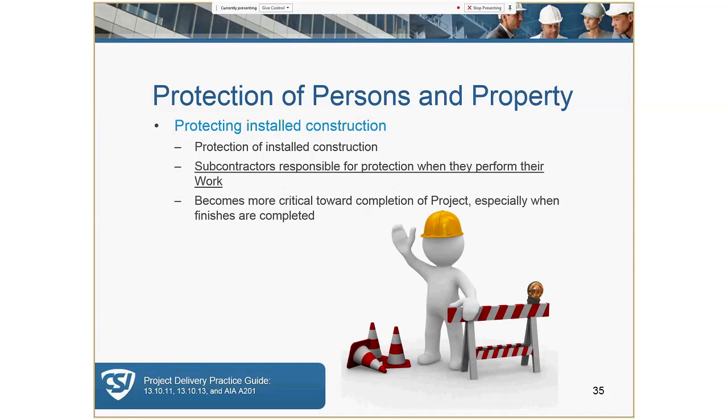Subcontractors have a responsibility to protect the work in place, not just their own, when they perform the work that they are contracted for. So this is pretty logical and straightforward. But for example, if the painter spills paint on the carpet or furniture when touching up the door frame as part of a punch list item, then the painter is responsible for the repair and the cleanup. The same holds true for the carpet installer when he scratches a door or dings a wall base or wooden base or damages some other part of the building. So everybody has to be respectful of the other trades.